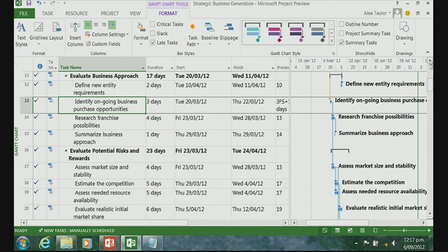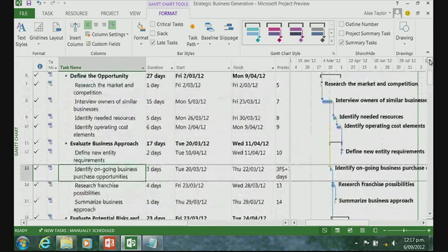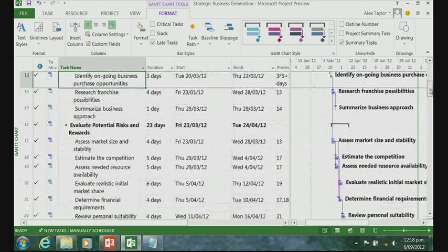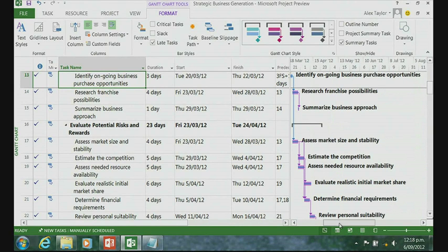So what you'll now be able to see in the Gantt chart is that for that particular task, I can quickly see exactly which tasks are predecessors to this one. And if I turn on successors as well, and you can turn on all 4 in there at the same time, you'll see that all the successors to that task have lit up pink now. There we go.